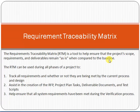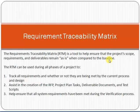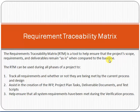What is a baseline? Whenever we start a project, we set a baseline — a measure through which we can track the performance of a project. For example, at the initial stage when a project is signed, we decide we have to deliver five modules to the customer. This is our baseline. At a later stage, during execution, if the customer says they need six modules, that is a change in scope compared to the baseline, and we have to raise a Change Request (CR).